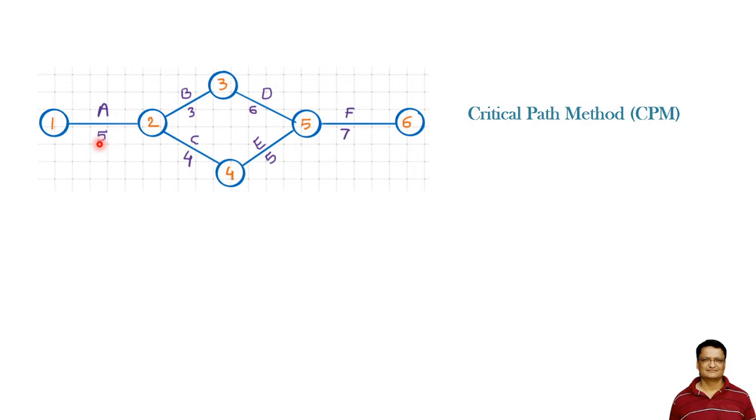We do not provide any flexibility at this point and we are certain that each activity will be completed within the specified days. What happens if an activity is not completed in the given time is not taken into account. This is a typical example of a deterministic model.